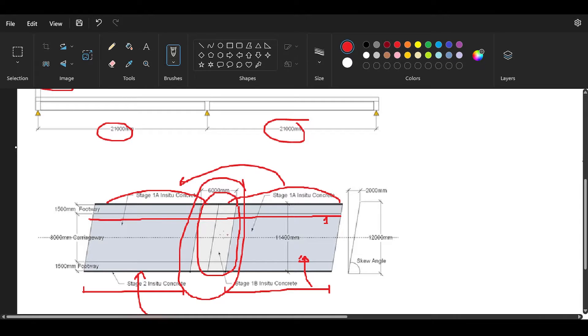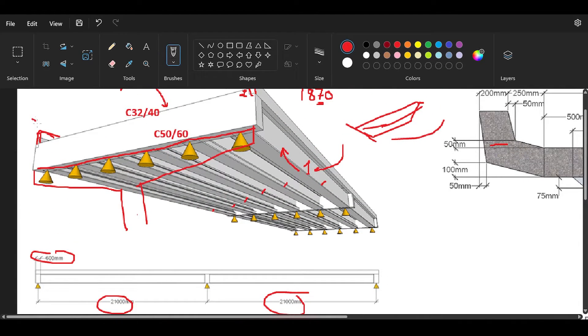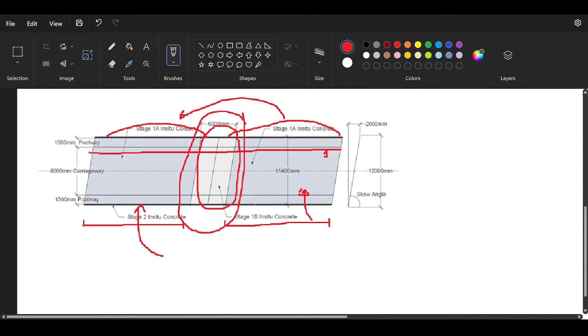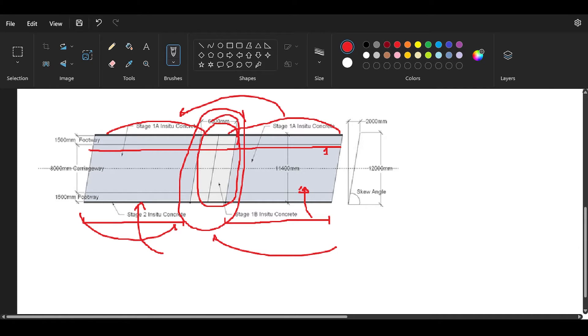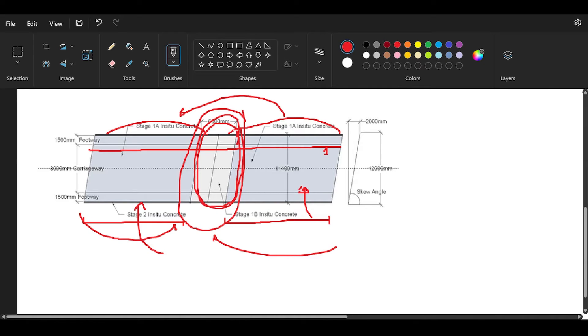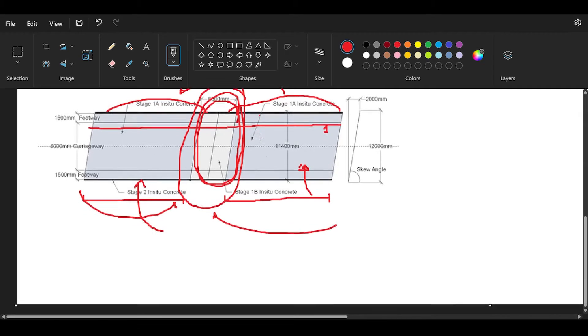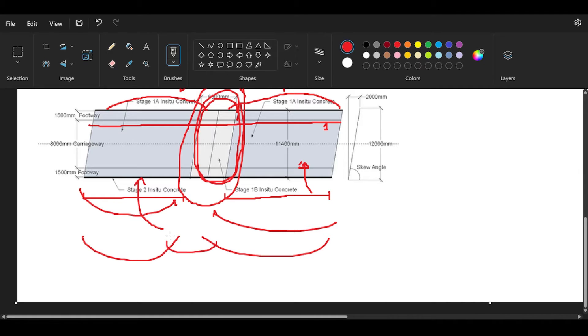Since you are using precast beams, those precast beams come at a certain length. You might have precast beam number one until here and precast beam number two until here. You want to cast this entire thing to connect those two precast beams as well as the diaphragm. The intention here is to cast the six-meter infill slab with the central diaphragm, which when it becomes hardened will make the beams continuous over the central support.